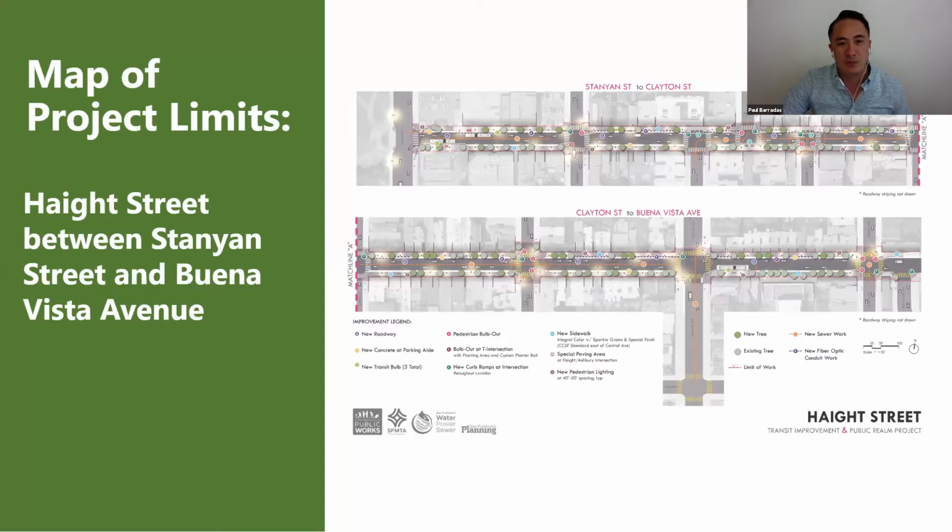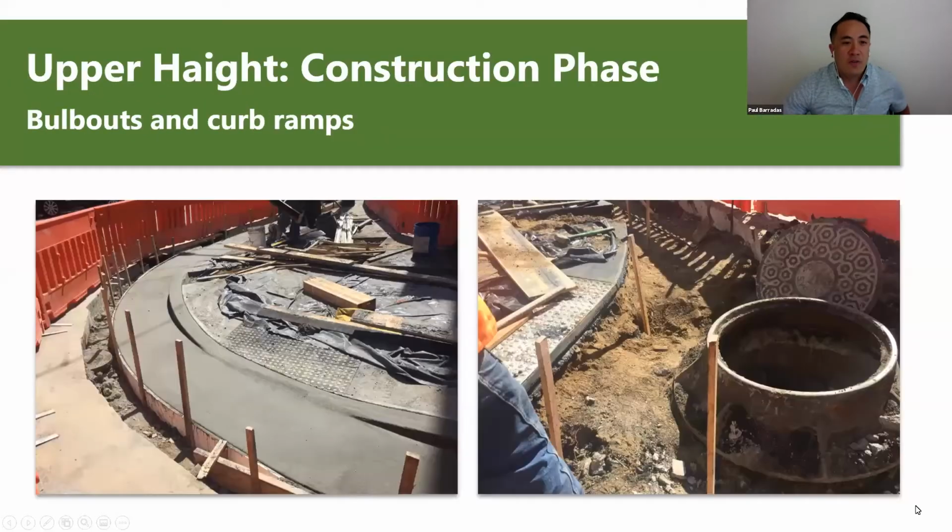The project was sponsored by Public Works, the San Francisco Municipal Transportation Agency, SFMTA, the Public Utilities Commission, SFPUC, and the Department of Technology. The work included 4 traffic signal upgrades, 14 sidewalk extensions at the corners, or what we refer to as bulbouts, 3 bus sidewalk extensions to assist with passenger loading and unloading, more than 70 pedestrian scale lights, over 40 new trees, 8 new sidewalk planters, new trash receptacles, new wastewater pipes, and paving throughout the 10 blocks.